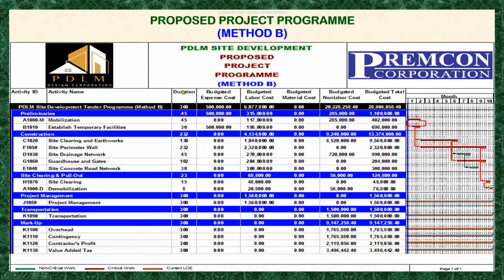the look is a little bit different because we have added a markup element here to show the total sum of all the markup costs for all the direct and indirect activities. So that means on the upper side, each direct and indirect activity has no markup cost added onto it.